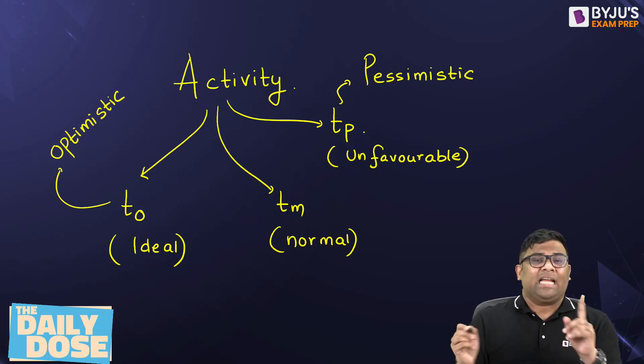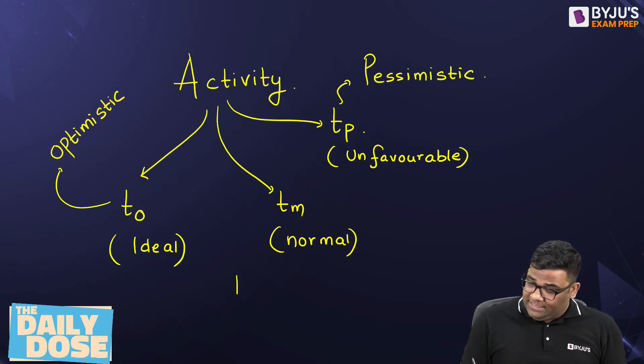Now, pessimistic time will be more than your most likely, which is under normal conditions. And that will be more than your optimistic. So Tp is greater than Tm, which is greater than T0.